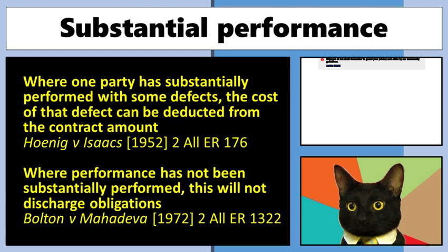The other side may have all sorts of excuses that they give you. Oh, my supplier had a problem with this, and my mum's not very well, and these things. We don't care. The courts don't care. When you enter into a contract, if you are going to have a hard time getting carpet, in this case, from your supplier, don't enter into a contract, because the person that you've contracted with to fix their house, they don't care. It's not their problem that your suppliers are having problems.